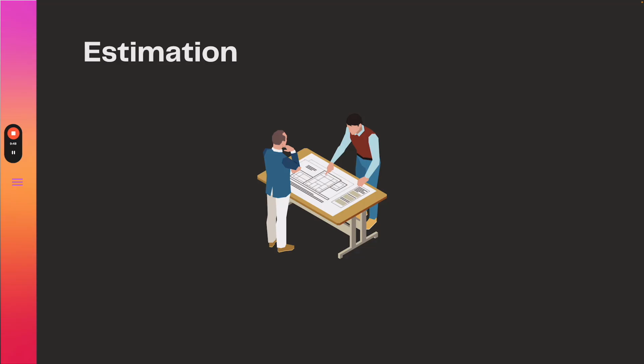Then think about using some estimation techniques such as planning poker or 3-point estimation to arrive at a consensus estimate, of course, if you're in a team. So some good tools there: t-shirt sizing, planning poker. That really helps you kind of get a feel for what it is you're going to be building in terms of effort. Account for contingencies.